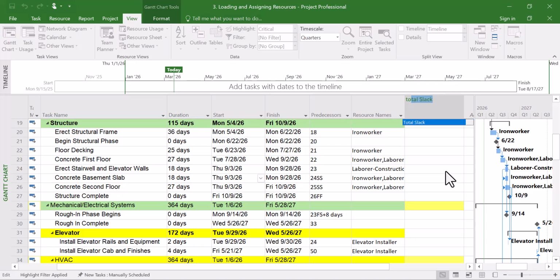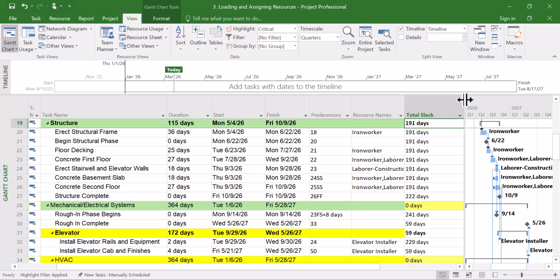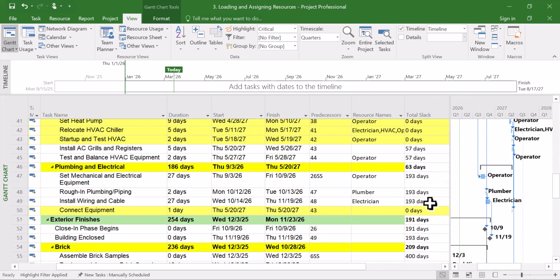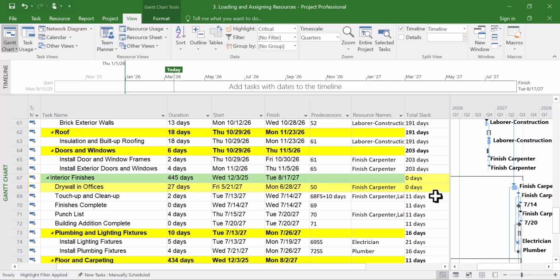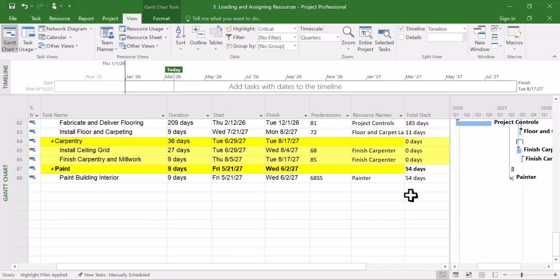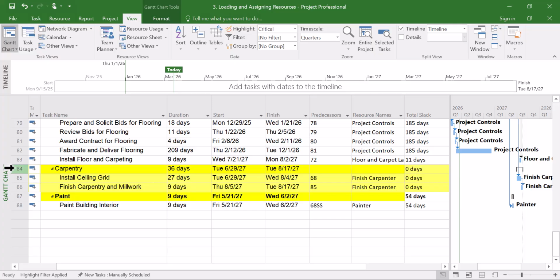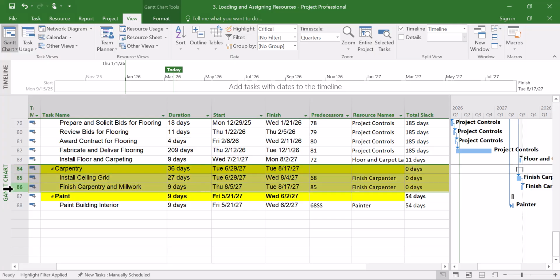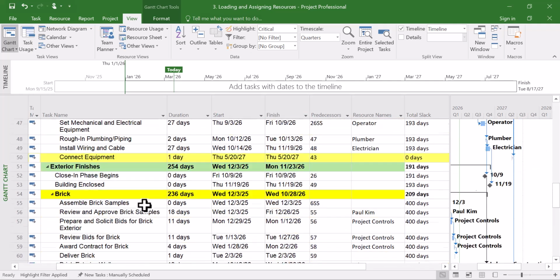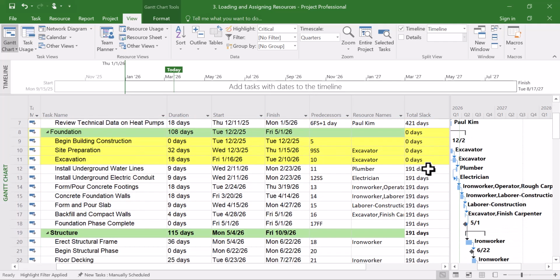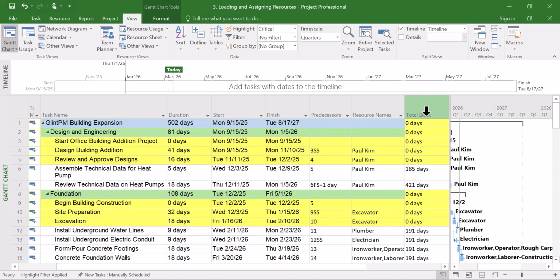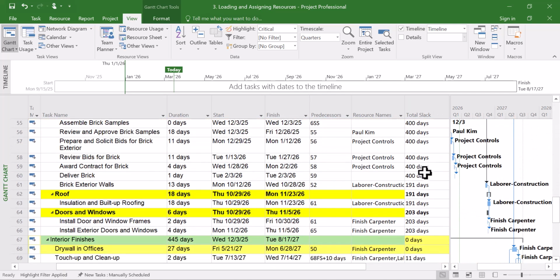There's one more thing I wanted to show. In P6 we had total float. In MSP it is called Slack. You can see Slack. So just like before, one major thing about critical activities is that the total float is zero, right? I'm still going to dig deeper into this explanation later. So you can see all the activities that were highlighted, they have zero total float, in this case Slack. So take note of that, guys.